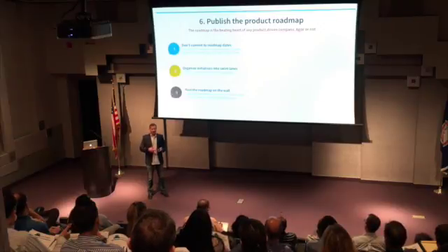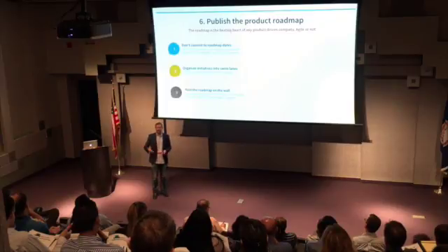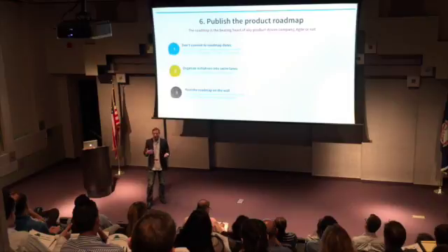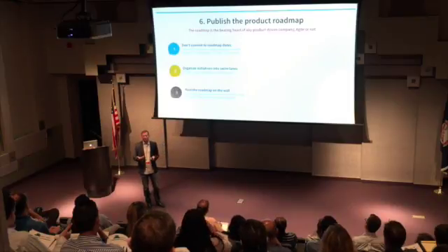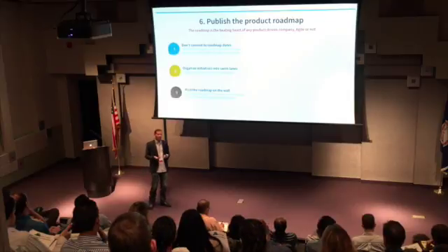Nor do you want to wait until the product's been internationalized, and then the reality is now you've got to make your hire for your European sales VP, but it takes you months to find the right person and get them up to speed, and in the meantime you've had this product that couldn't be sold for a year, right? So there's a little bit of coordination that needs to happen, and coordination requires some level of, not necessarily commitment, but some level of expectation setting, and I think a roadmap can help to pull that kind of thing together.